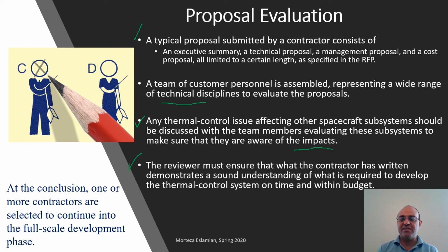That then tells that the contractor may not be aware of all aspects of the technical design. So in order to select the best proposal, at the conclusion, one or more contractors are selected to continue into the full-scale development phase.